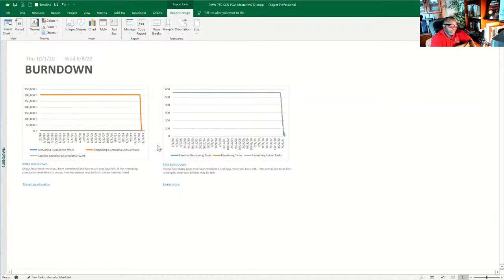Do you see in these meetings when you're presenting schedule, do you typically do 5 days out, 10 days out, or do they want to see the entire thing of hundreds and thousands of lines? So the reason why I showed the first schedule with Agile is, throughout these meetings, that's what we practice, but it's not really advertised. So whenever I conduct a report, it's always like a 2-week look ahead. Okay. Gotcha.